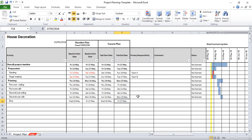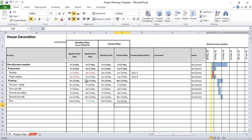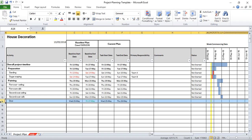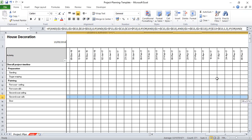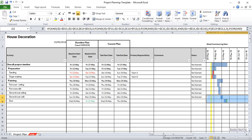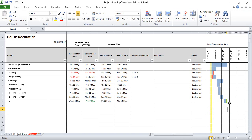If I decide that the door is only going to take me one day because I've got some help, and I reduce that date to the 26th, then the baseline end date has gone green and on the Gantt it will display as green. You'll notice there's no Gantt line for this particular task because we inserted it as a new row earlier. This Gantt chart is powered by Excel formulas, so what you need to do is copy the row above all the way to the end and drag those formulas down one row. By doing that, you will then see the Gantt line for that row. That row has now gone green, meaning that task is going to be finished one day early.